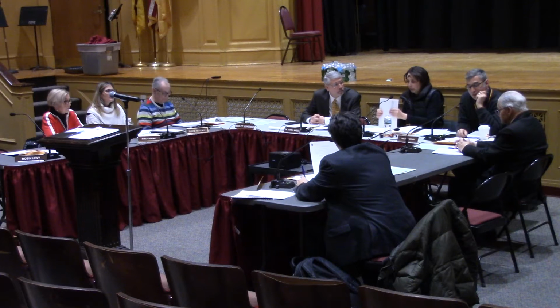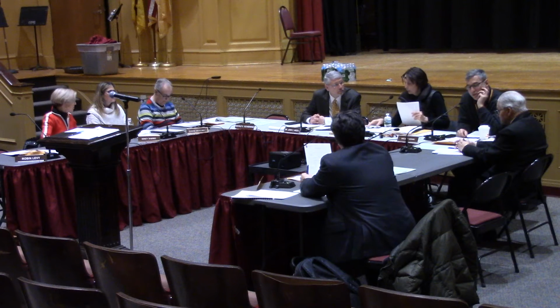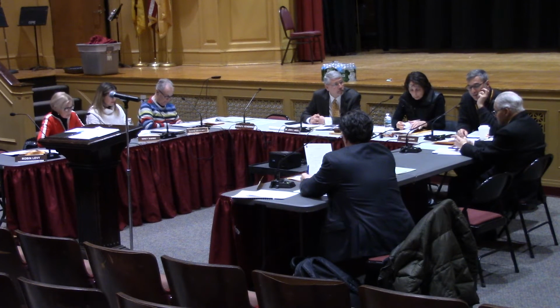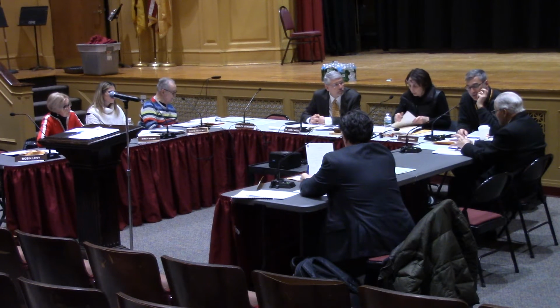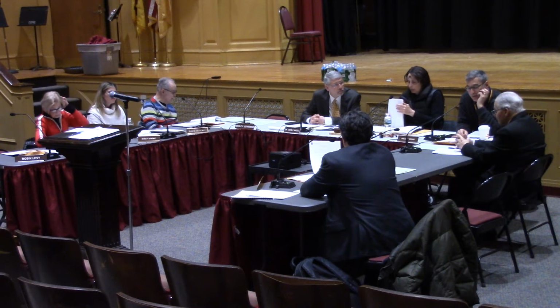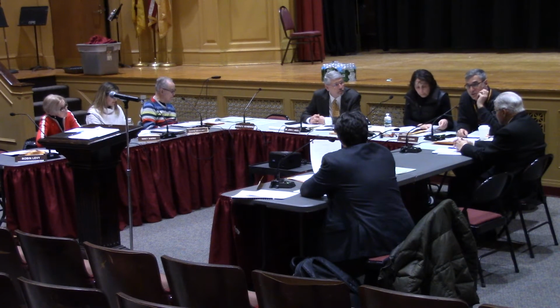And so at this point in time, I don't want to say it's low-hanging fruit, because nothing is easy when you start to remodel down there, but it's high priority. What we're going to get out of this is we're going to free up enough space to get those groups down into the basement to make it effective, because currently it's not utilized at all for instruction. Based on these cost estimates, it's going to cost us anywhere from $450 to $600,000. Going beyond that is just too expensive for me.